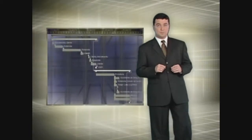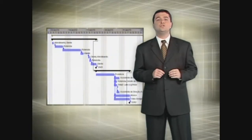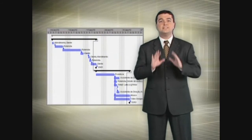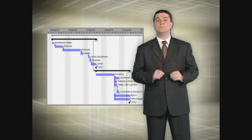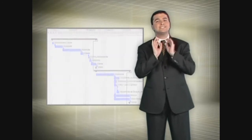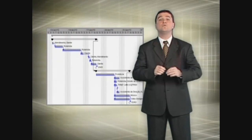Following up a project means carrying out the control process to ensure that the plan is being executed as foreseen. To do this, actual work that has been inserted should be compared to the baseline of the project. The baseline is a set of the plan's data that will serve as a parameter for comparison with the execution of the project. It is just like an exact photo of how the plan should be executed.